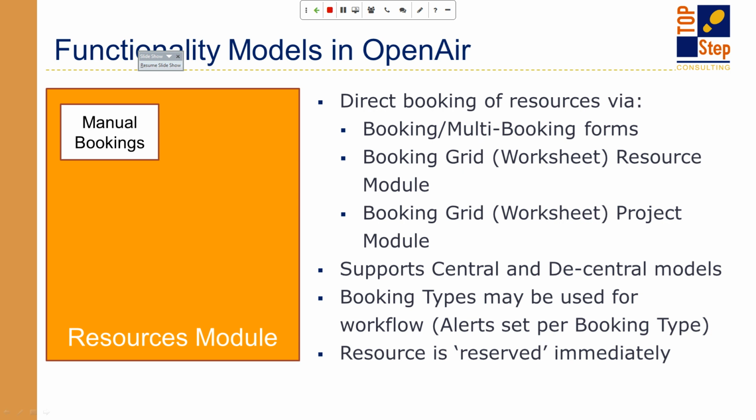They're really great for managing your process workflow. You can set up email alerts based on a specific booking type. A really good example of workflow that I've personally implemented, and a lot of customers have, is a booking type called requested. Some resource who has the ability to create bookings, but maybe not the final say on who gets booked when and where, can create a booking, and maybe there's a form permission or a permission rule that says that particular resource can only create bookings with the requested booking type.